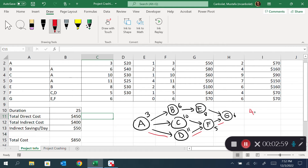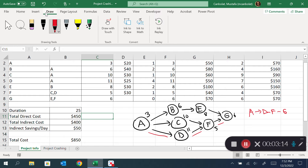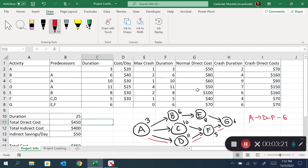So the project duration is 25 days, and we call A-D-F-G our critical path. Let's say the company wants to reduce the project duration from 25 days to 24 days. They need to look at how much it costs to reduce the project duration.